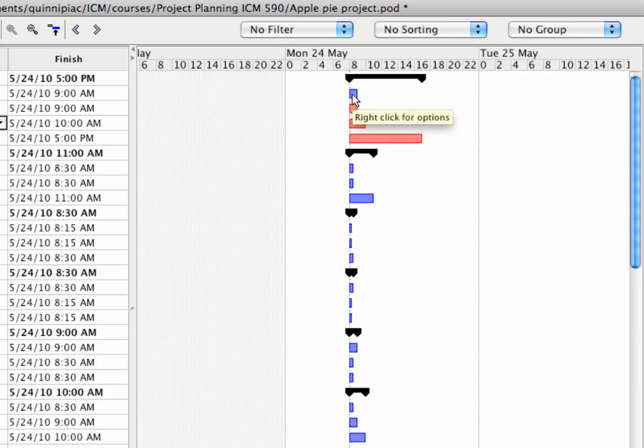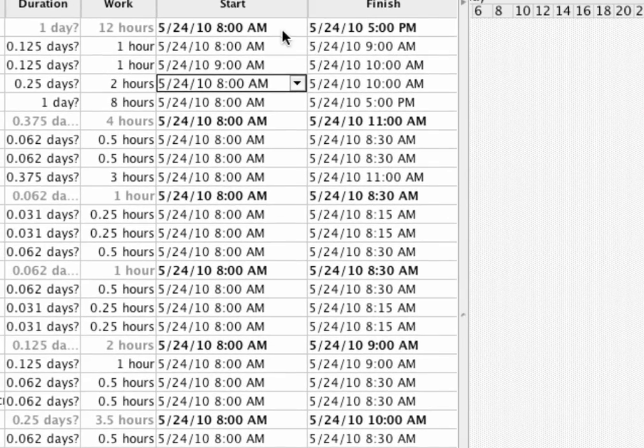So if I just click on that first Gantt item and drag that little link line to the second one, you see it draws an arrow to the second one and offsets it by the amount of time that the first item, selecting research sources, takes. So now if I go in and change the start time of research sources, let's say to another date,